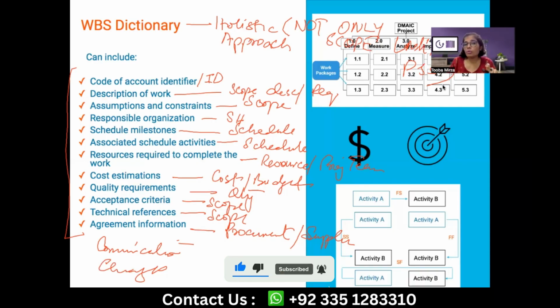The answer to that question is, as we move along in the project planning, after this, we will move to the schedule development. Before the schedule, we should have our resource planning done, then schedule. Schedule will give you your project finish and start date, and accordingly all the WBS elements will mention start and end date.